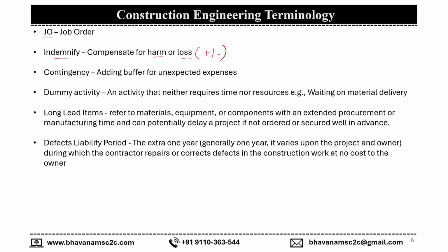If you're preserving some material within the site and it is stolen by someone, because the contractor is not staying at the site 24 by 7, but for certain projects the owner is liable or responsible for protection and security. In that case, if the contractor loses a material, the owner has to compensate. If not, if the contractor has insurance, then it will be claimed through insurance accordingly. Whatever it is, the concept of compensating for certain harm or loss is called indemnify or indemnification.